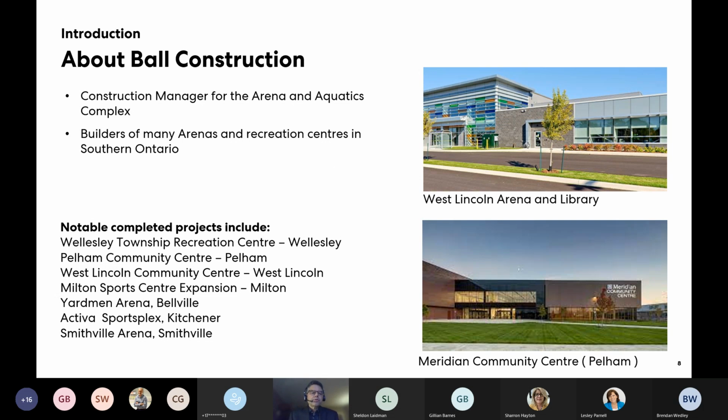And joining us earlier this year is Ball Construction. Ball was selected amongst 3 others to become our construction manager for the complex. They are the builders of many arenas and recreation centers in Southern Ontario, and they're brought on board to help us in the costing process and in the design review to make sure it's constructible and efficient and practical. And then they will tender our documents to different trades and manage the construction going forward.